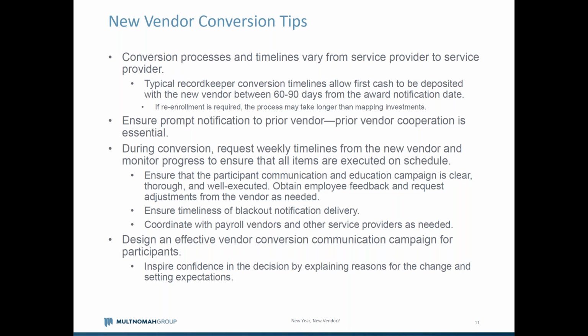And then coordinating with the other ancillary vendors that may interact, primarily with payroll. A lot of times as you make changes in vendors, it's an opportunity to potentially change the type and level of data that you're providing to the record keeper, and there's some benefits from providing a greater data set to them than some of the limited data that sometimes gets provided. So coordinating to make sure that the payroll file formats match and are mapped to the right sources in the new record keeping system, and that includes everything you want, is important to keep in mind.